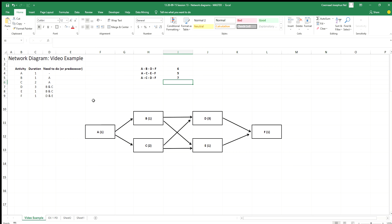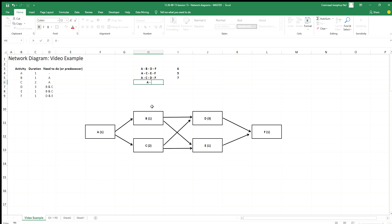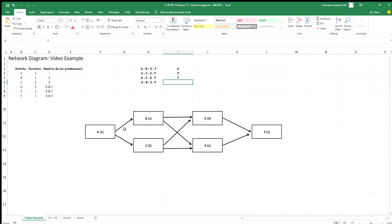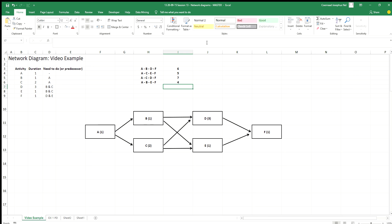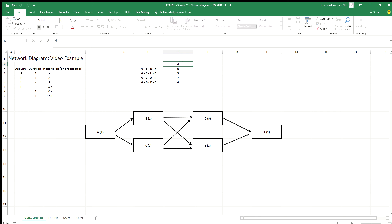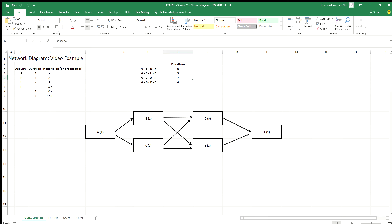The last route is A, B, E, and F. The durations are: A is 1 + B is 1 + E is 1 + F is 1, giving a total duration of 4. So those are the durations of my different paths through this project.